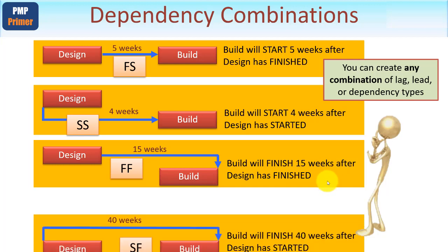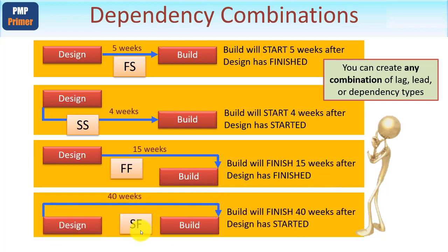One more for luck. This is called SF. Now, it doesn't stand for science fiction. It's actually quite a useful linkage, particularly in the construction industry where you're using common resources. This says that the design can't start until the build has finished. But I've put in a 40-week lag here, showing that the build will finish 40 weeks after design has started. And frankly, I could have used any combination here between finish to start, finish to finish, and so on, and lags and/or leads. But at least you shouldn't be fazed if you see any of these coming up in your exam.